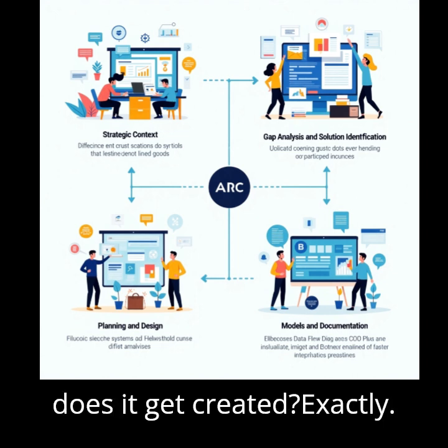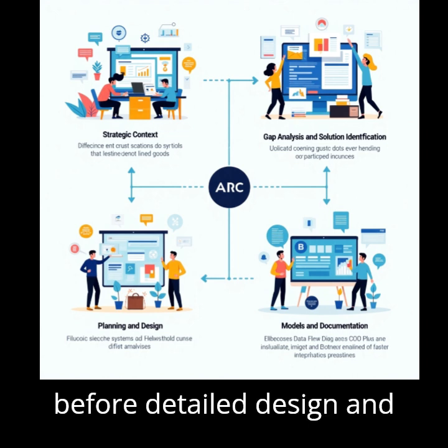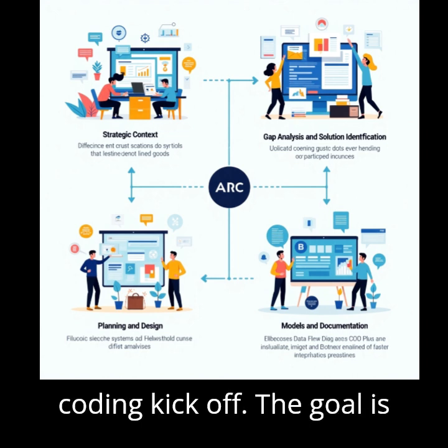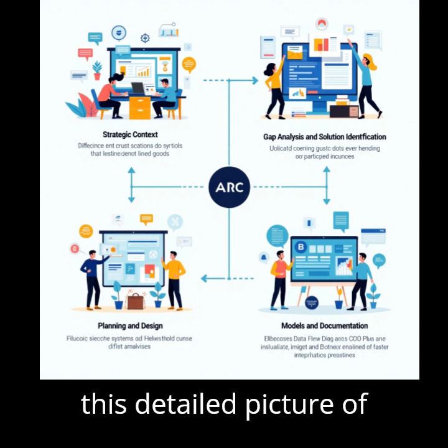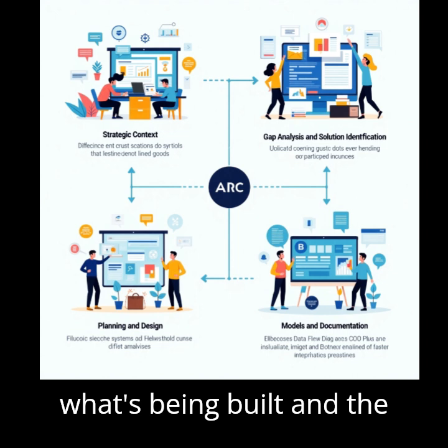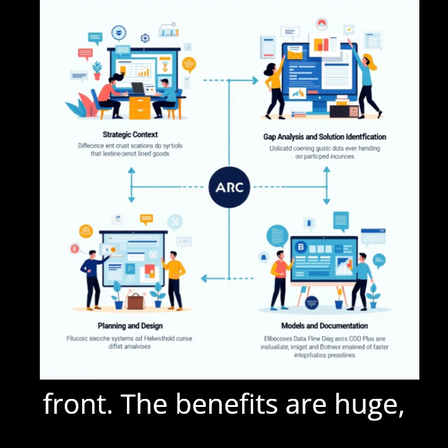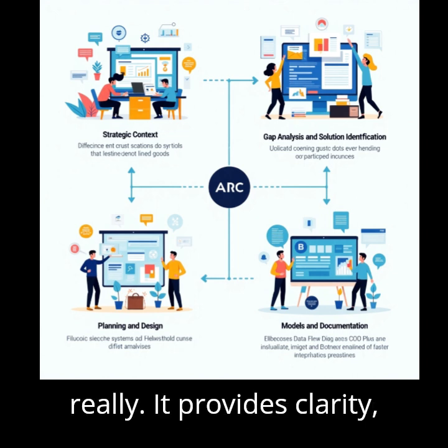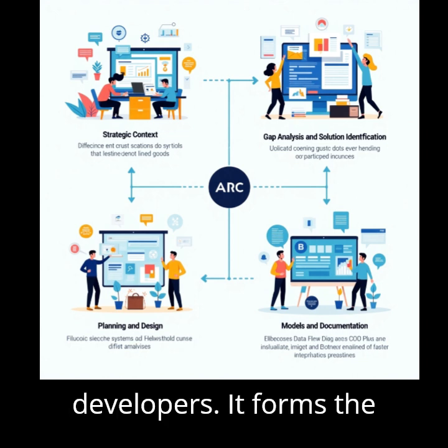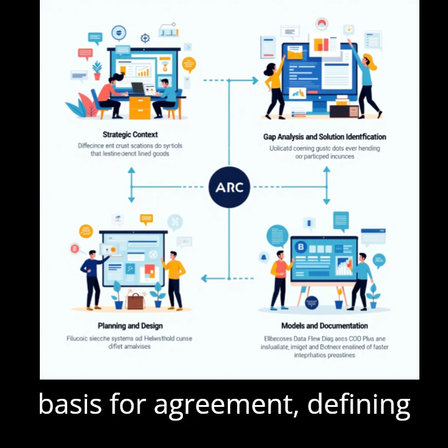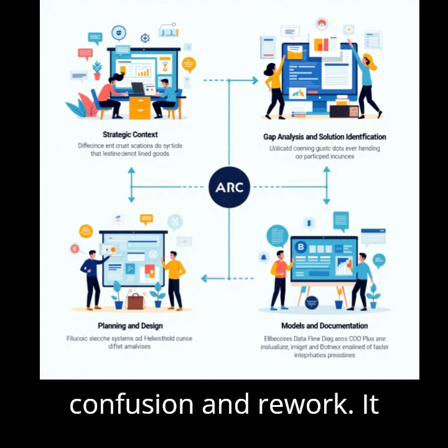When does it get created? Exactly. It's done right at the beginning, after the initial idea is fleshed out, but before detailed design and coding kick off. The goal is to get everyone, developers, clients, users, to agree on this detailed picture of what's being built. And the payoff for doing this? It sounds like a lot of work up front. The benefits are huge, really. It provides clarity, avoids misunderstandings later, it guides the developers, it forms the basis for agreement, defining the scope. It can actually reduce development time overall by preventing confusion and rework.